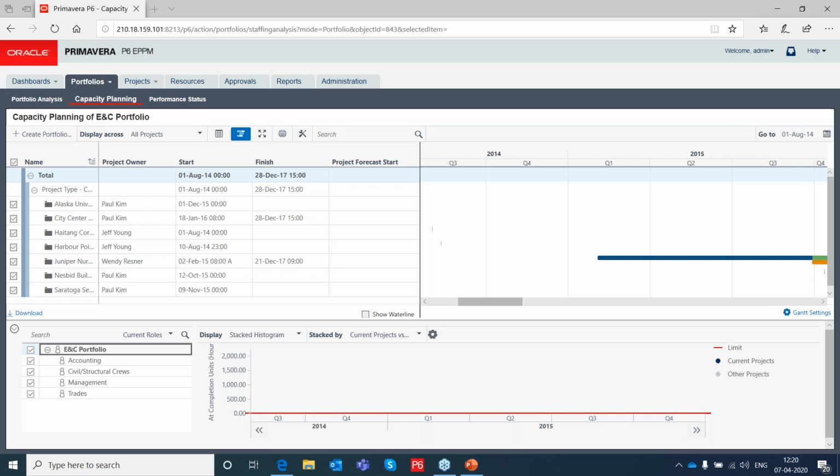Okay, basically you can use activity codes for grouping it based on different areas or project sites. Then, for each and every area or project site, you can have a responsible person assigned and ask him to monitor the resource also. That is one suggestion. Normally, people have different areas within the site.